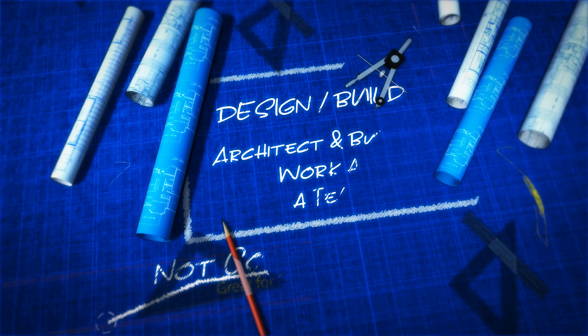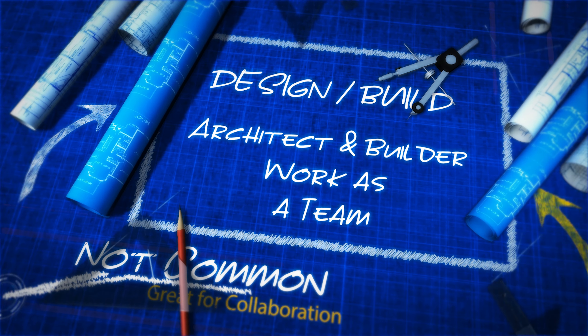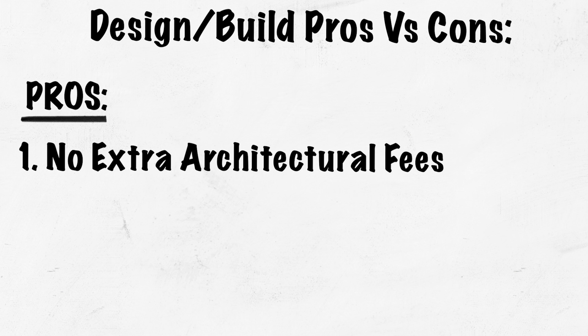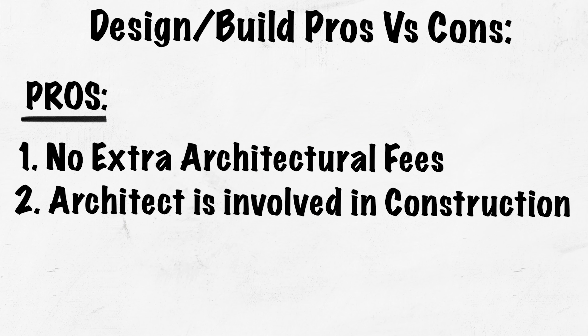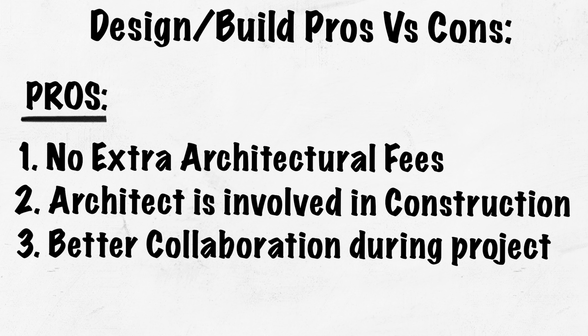Number two is the design-build team. One good thing about a design-build team is that the architect doesn't charge any additional money during construction — he helps the contractor as necessary and explains to the owner what needs to be done and why. There's a greater level of collaboration between the architect, builder, and homeowner. A lot of consultation that you would be charged for separately in the first arrangement becomes part of the overall construction cost in a design-build arrangement.